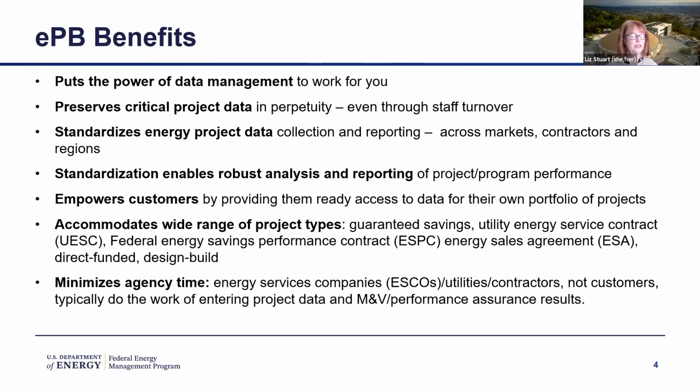And eProject Builder does accommodate a wide variety of project types, including UESC, ESPC, direct funded, the Federal Energy Sales Agreement that combines a PPA with an ESPC design build. And the idea here is to have the ESCO, or the contractor, be the main one responsible for entering the data in the system, and then the customer or project owner gets to review that and see if that project information coincides with what they're seeing in the contract itself.